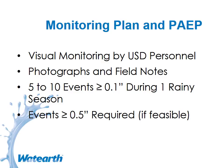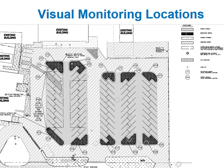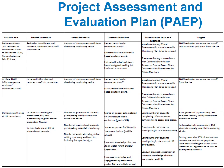And the infiltration basins were supposed to have a depressed area to act as a sediment basin, which is really key in an area of high dust and sediment. Unfortunately, that's a lesson learned from construction, but they are starting to accumulate and block some pollutants. In a typical parking lot, we would expect fairly extensive pollutant loads based on standard EPA tables. But for this project, we're expecting 100% removal simply because we're not expecting any runoff except in a very extreme event.